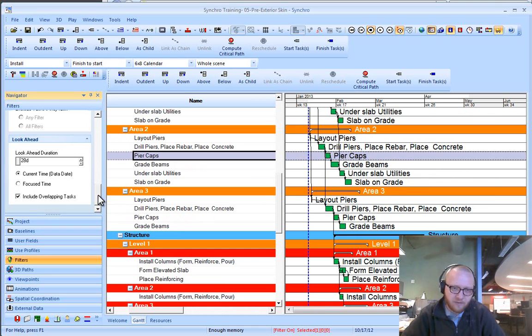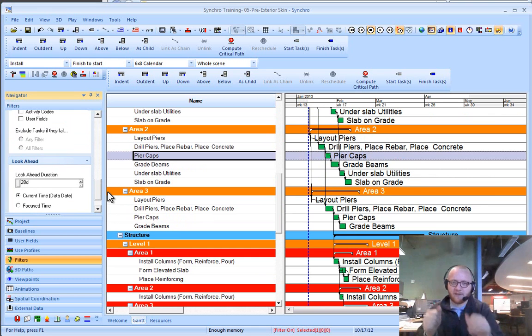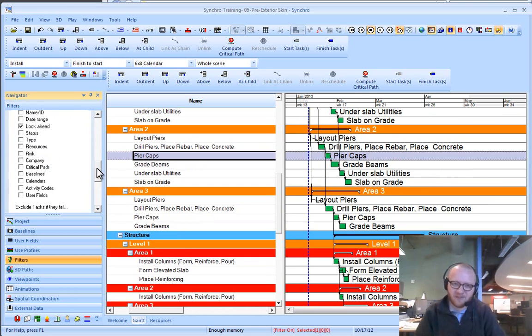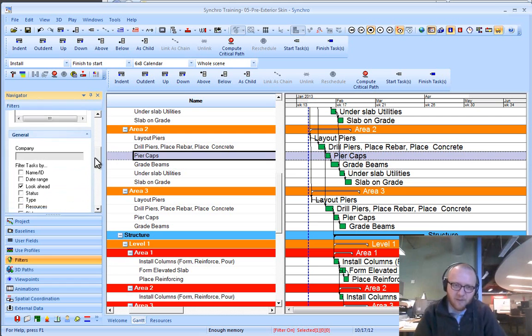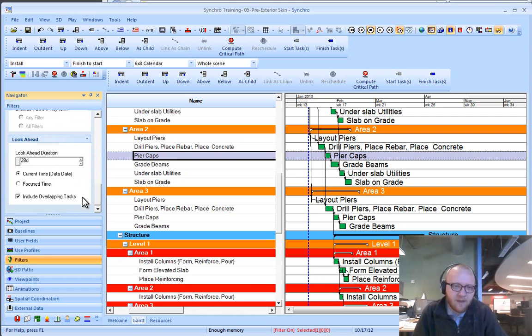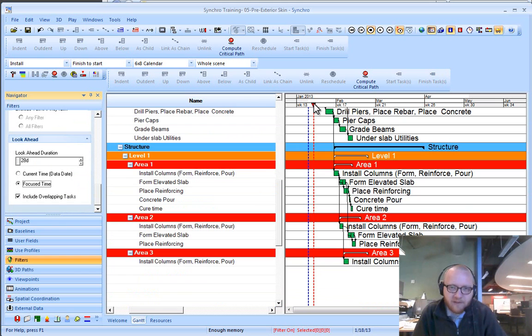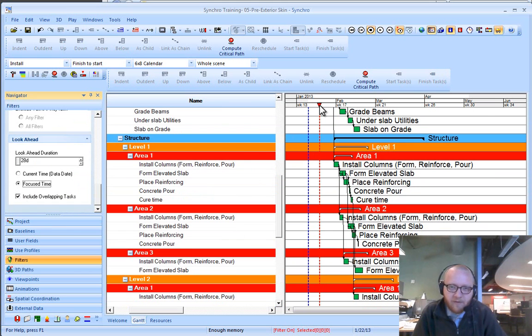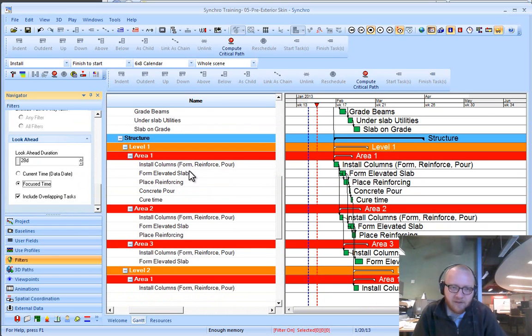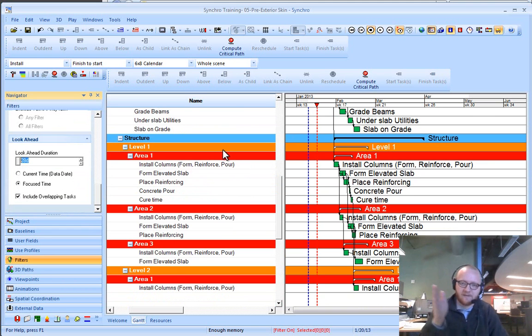Make sure you have overlapping tasks checked. Otherwise, it will only be activities that start and end within that 28-day block, which is very seldom helpful. The other option we have there is to lookahead from the focus time. I usually tell people to turn off and put away the focus time, but it can be very helpful for taking a chunk look at the schedule.